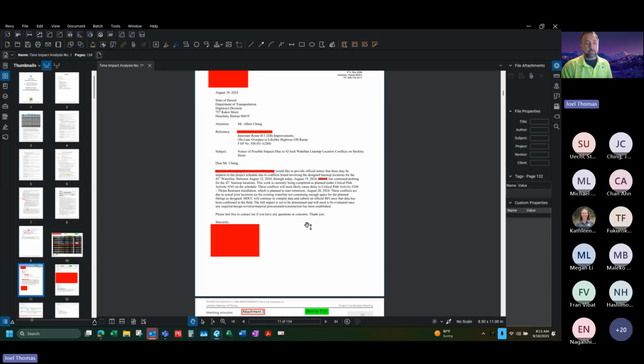I think it's about just making sure that we have all the documentation so that later on, when we go to grant a time extension, we have all that documentation to fall back on and say, yeah, they meet all the spec requirements and we're able to grant this time. So it's not a matter of just not telling them and hoping that they forget. It's more, let's make sure that we're following the spec. So just tell them in the meeting that they're bringing it up: hey, you got to make sure you're getting in your notifications to us so that we can later justify this time.